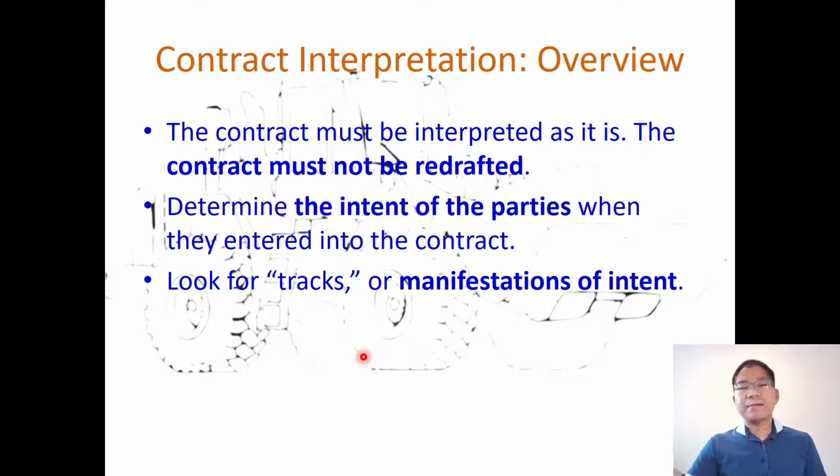So with that, to consider breach or not breach, we need to interpret the contract. So, overview: the contract must be interpreted as it is. You cannot say, oh, this one is a typo or something, let's change it before we interpret. No, you cannot redraft the contract after you sign. And determine the intent of the parties when they enter into the contract, because sometimes the words cannot say everything.